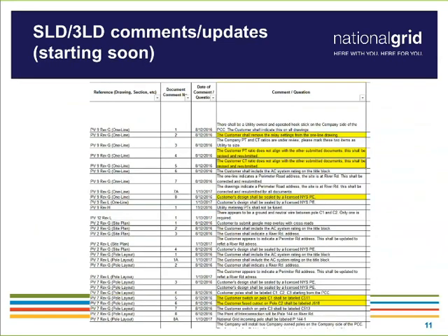We've been going through some revisions of the CESIR, and it's going to be condensed. So this is what the new version is going to look like. It's going to be in an Excel spreadsheet. It's really going to detail a lot of different things. It's going to reference the drawings, any document numbers on those drawings, the date the comments were made, and any comments or questions that the engineer has.